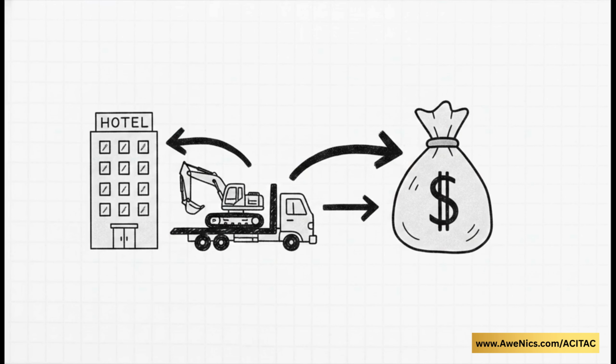But wait, there is actually a third type to know about: cost resources. These are your fixed, lump sum, indirect charges. They don't have a quantity, and they definitely don't have an hourly rate. Think of things like mobilization charges to deliver that JCB to the site, or maybe booking a hotel room for a big project review meeting. It's simply a flat expense that you need to tie directly to a specific activity in your schedule, just so your overall project budget reflects reality.